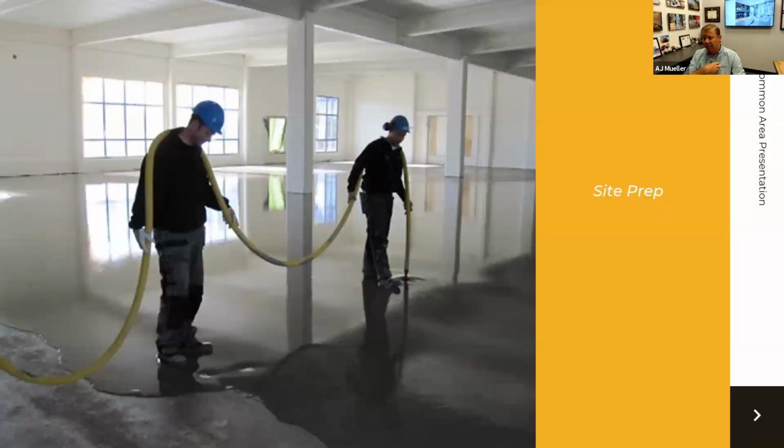So one of the challenges, unfortunately more often than I'd like, is we order hundreds and hundreds of thousands of dollars worth of glass from Europe, promising a whole 2 dimension on a shop drawing. And now our teams are tasked with making sure those openings are within a 1/4 inch based on the floor, which is the hardest one to adjust, obviously the headers and the walls that we build. And when they arrive, the moment of truth is, if they manufactured them tight to those dimensions without a 1/4 inch of mishap, and we finished that concrete floor without a 1/4 inch mishap, it fits in perfectly. It's a very stressful process. There's a lot of time, effort, and money involved with that. So that's one of the big ones there.